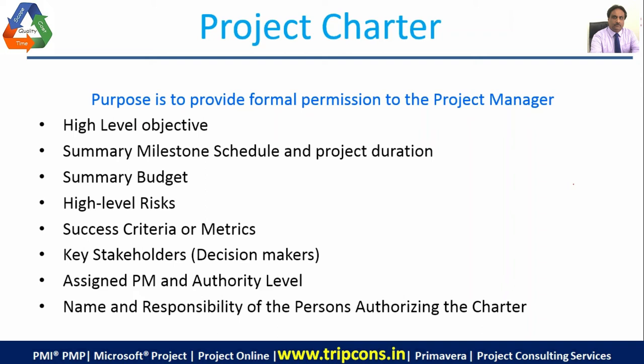The first deliverable is the ground floor. The second deliverable is the first floor. The third deliverable is the second floor. The fourth deliverable is the third floor. And the fifth deliverable is the fourth floor. So you have got five deliverables, right? Once you have the five deliverables, you link the chopped up payments with that. You say that, okay, when I deliver you the ground floor, you pay me $100 million.